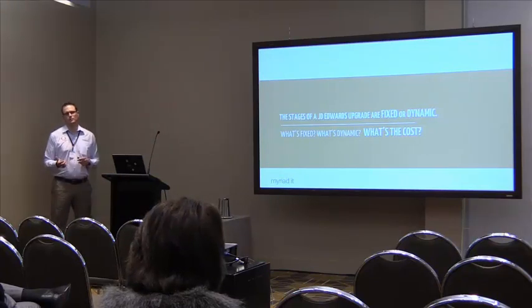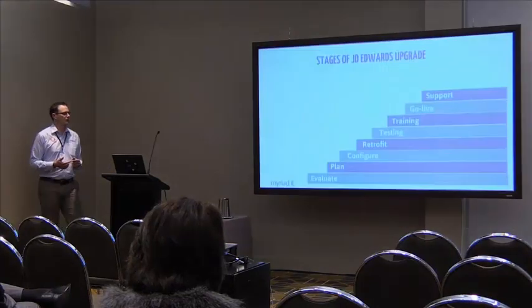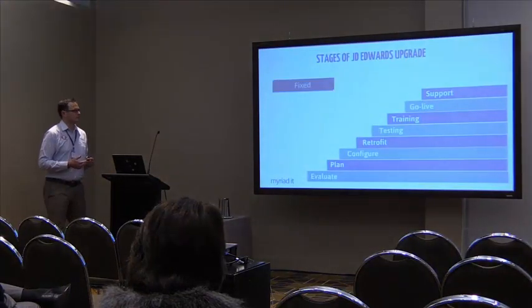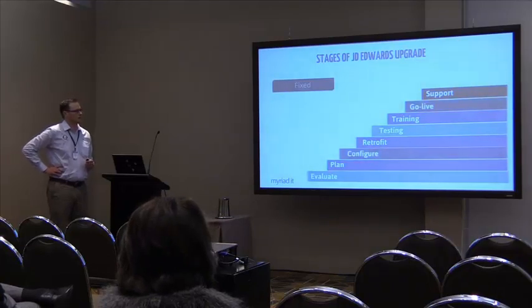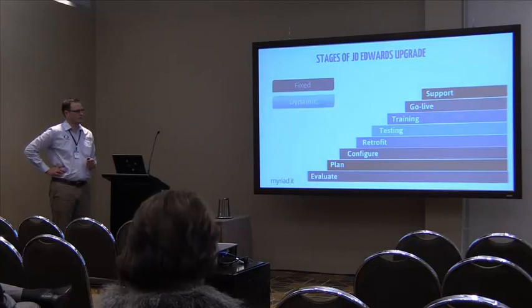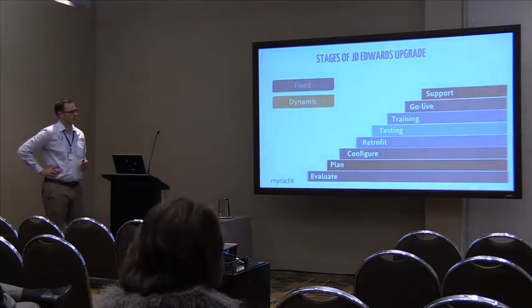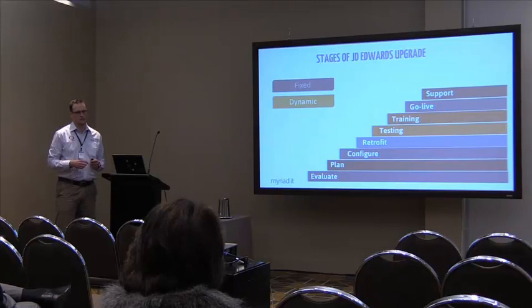Which ones are normally fixed and which are normally dynamic? The fixed ones that we see are support, go live, configure, plan and evaluate. The 3 dynamic ones are testing, training and retrofit.